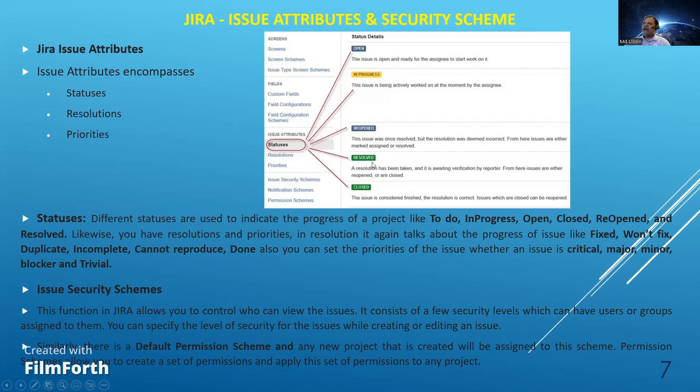If it is resolved, it means completed, though there was some problem, right? It was in progress and there is some issue with that. Maybe that issue is dependent on another team, Scrum of Scrums. So without that team doing the job on their end, we cannot do the job on our end. So that is dependent on that other IT department. So we can keep the status in progress. But once they have done their job, then we can put that as resolved.